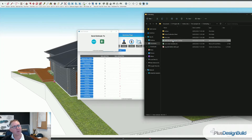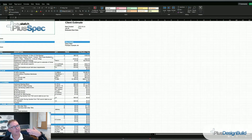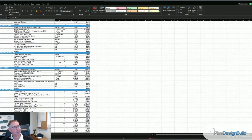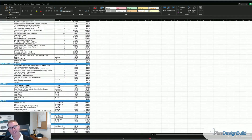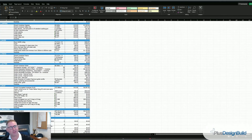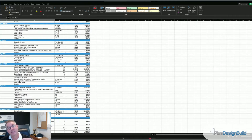Save. Now I have my first quote. The benefit is when I open it up, it has time-stamped everything for me — I've got my date, I also have everything I've allowed for in the job, the price I allowed for, and everything that's in there. It's such a good way to keep a record of where you're at with your quote. Also, if you've built the job and the client's agreed to this quote, it's a good way to go in and add line items for things you might have missed — you can charge them as variations or update your estimating in Plus Design Build.